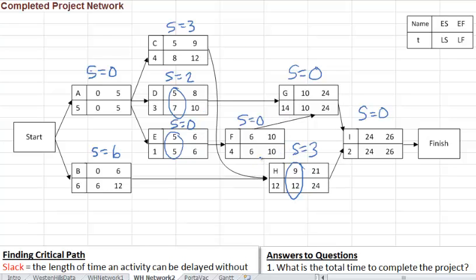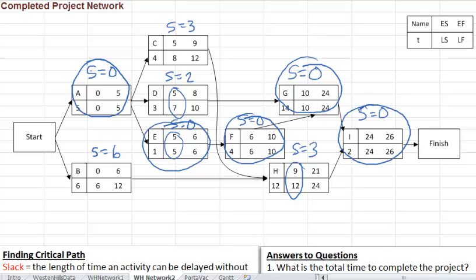And the critical activities are the ones with no slack allowed. No slack, no delay allowed. So that would mean if we were to go and circle the critical activities, A would be one of them. And then E, so we're just circling the activities with no slack. And here G and I.